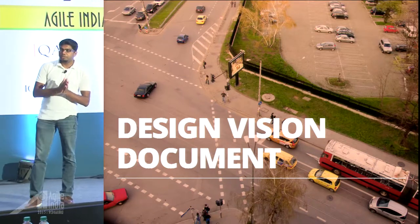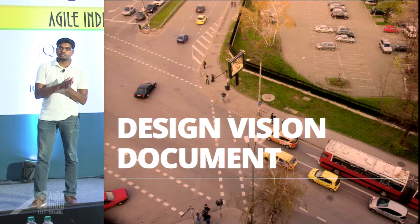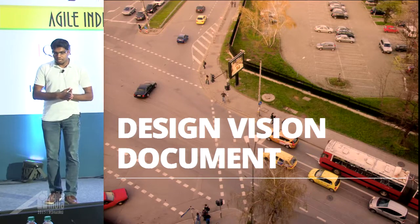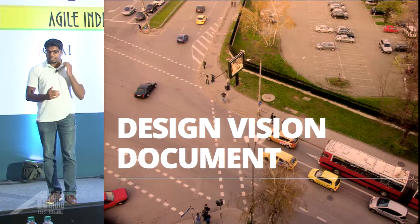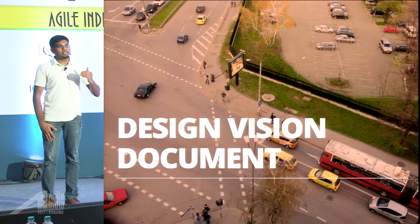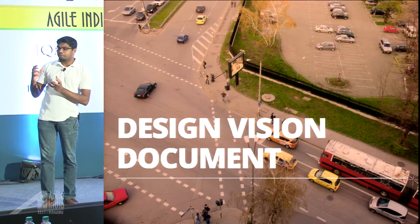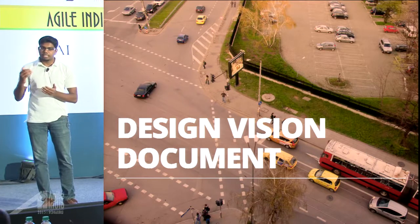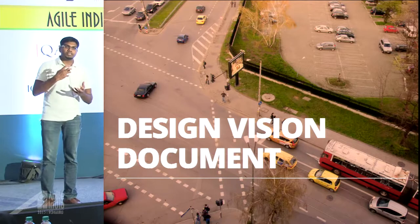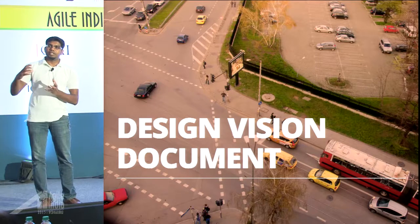But in Agile, we believe that we want to break the larger chunks of work into smaller work so that we could get feedback quickly and also we could course correct the problems that we face during the design process itself. So what we decided was to create a design vision document. This document basically has a higher level understanding of the design itself, which means when we finish this project, the design is going to shape up in a particular way, rather than getting into each and every component of the design and understanding it at a deeper level, which is going to take a longer time. Rather than spending more time on that, we wanted to break the design process itself and incrementally design the project.